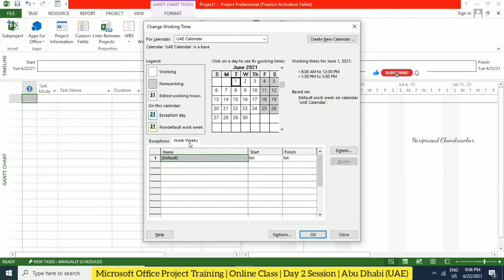This is only for the work week, like a standard. There are no limits, so this applies continuously all over the calendar, with Friday and Saturday as holidays. But we can also put some exceptions, where we can put the dates. Is there any specific date that never changes all over the year? For example, national holidays, any specific month, any specific days you have only one.